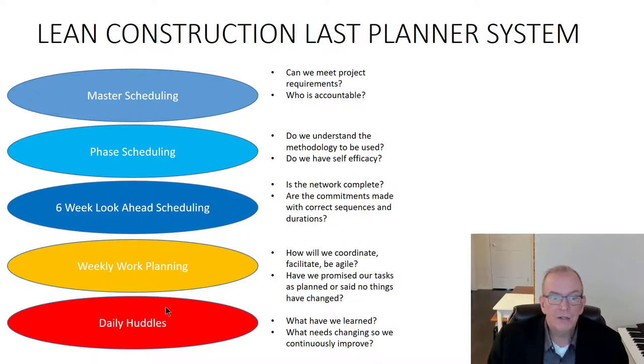And the daily huddles are actually daily meetings that are held standing up. You know how you do it on a football field? You have a huddle and the quarterback's going over what's going to be happening. Well, the daily huddle, it's done standing up. What did you do? Are you complete? Okay, great. Anything we learned from that? Anything we can tweak going forward into tomorrow? And there's also peer pressure because everybody was committed that they will do this. What stopped you from being able to do it?